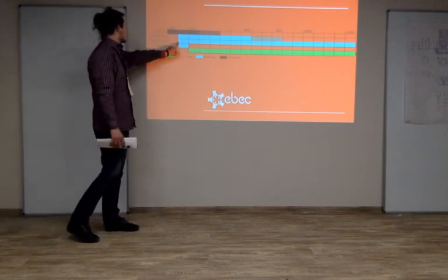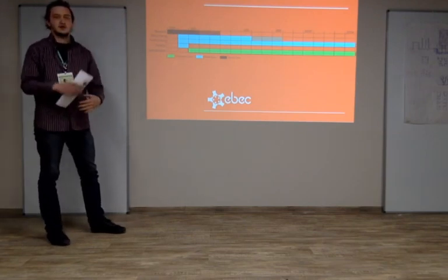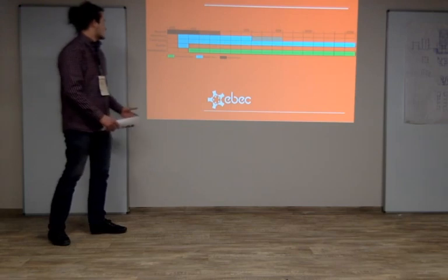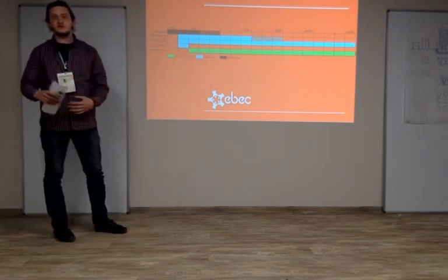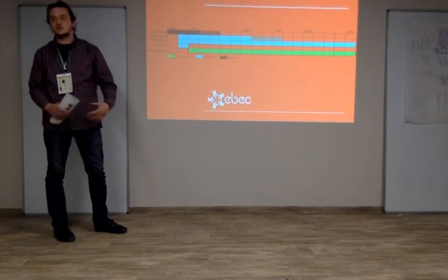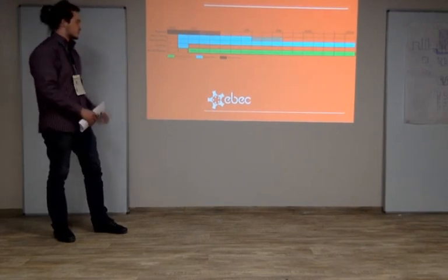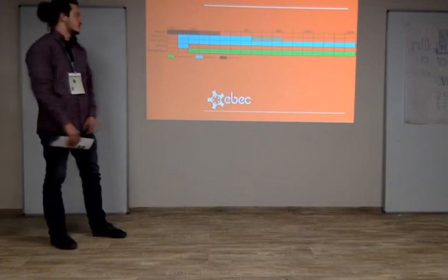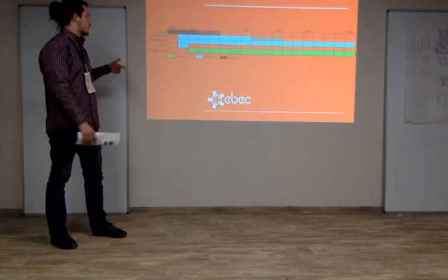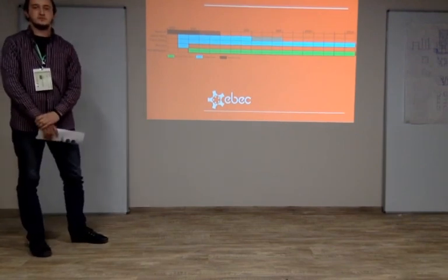After we do some fundraising, we can start the auction. After the auction, we can rehabilitate the buildings one after another, depending on the buildings that need to be rehabilitated. Priorities are made after the research, depending on the problem.